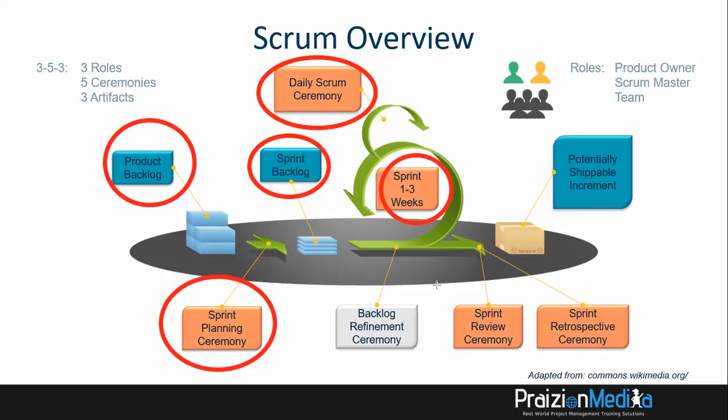All right, so the team continues working. And while the team is working, right there while they're working, backlog refinement needs to be happening. Why? Because you are moving to the very next sprint as soon as you get done with this one. Ultimately, the team is going to crank out the PSI, the potentially shippable increment, which hopefully will double as an MVP. And the MVP is going to be used for feedback. But that's another story. So PSI, potentially shippable increment. MVP, the minimum viable product. You need to know those for your exam.